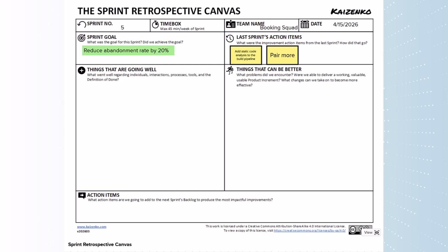So the sprint ends with the retrospective, where the Scrum team inspects and adapts their processes and comes up with an improvement plan. The Scrum team looks at what happened in the sprint as it relates to team dynamics, availability, capacity, schedule, impediments, tooling, quality of the increment, and so forth.